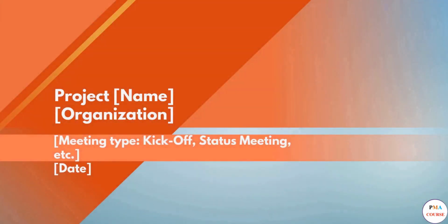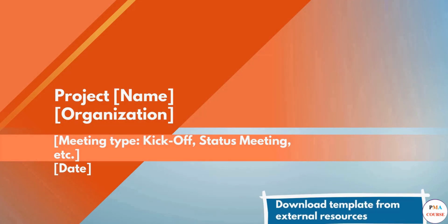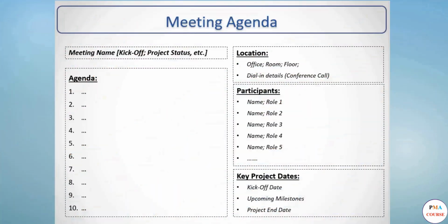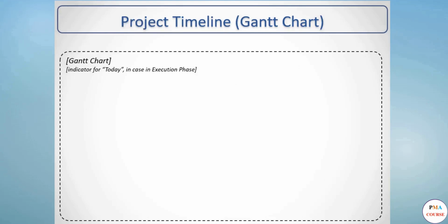So, we start with a cover page stating the project name. Simple enough, right? Then comes an agenda slide. Topics for the meeting, meeting information, location, teleconference number, date and time, that kind of thing. Timelines can also be added here. After that, a look at the Gantt chart, milestone table, and high-level status as a quick reference for people to see where the project is going.